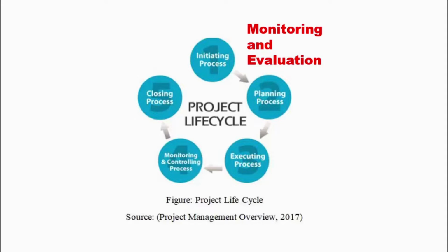And when those projects are being developed, the work plans state that in the first or second quarter, we're going to do the monitoring. After 2 years, we're going to do a midterm evaluation. After 5 years, we'll do the end of project evaluation. All that is part of the planning.